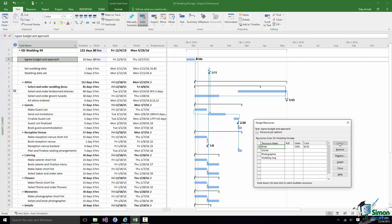When I assign a resource to a task it doesn't automatically close the Assign Resources dialog. You note there's a separate Close button. But what you can see is the number of units. 100% represents one Bride, so there's one Bride attached to that task. And the cost of the Bride working on that task is zero. Don't forget that the rate for the Bride chargeable to this project is zero dollars per hour. So if she's working on that task for ten days she's still not going to charge us any money.